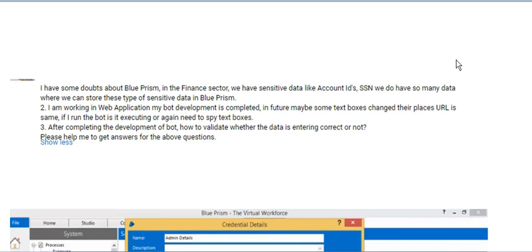That is the reason once we complete the development, the testing team has to test based on the client's test case creation. Usually most RPA clients create the test cases: this is the input, this is the output, and this is the feature we have to automate. They create more than 20 to 30 test cases. Based on the test cases, the test team will test it. Once it is completed, it is probably moving into UAT.